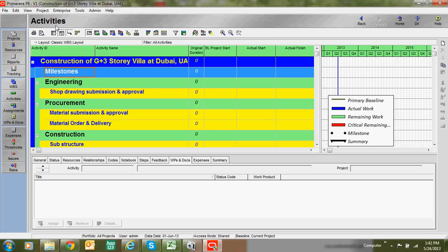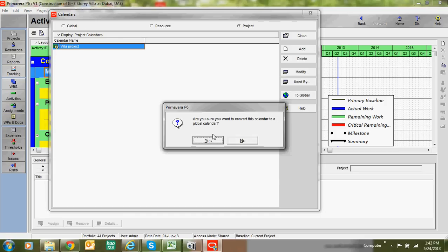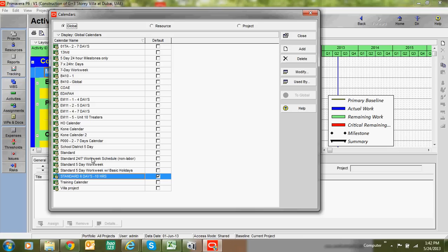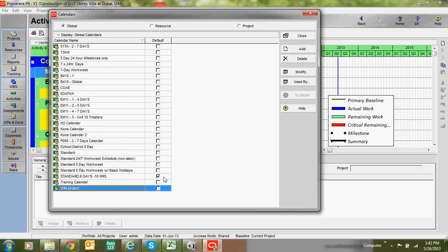After assigning the calendar, you need to set it as the default calendar. Go to Enterprises, then Calendar, find your calendar, and send it to Global. Then go to Global and set the project calendar as the default calendar. The reason for this is that whenever you add new activities, this default calendar will be automatically assigned to them.